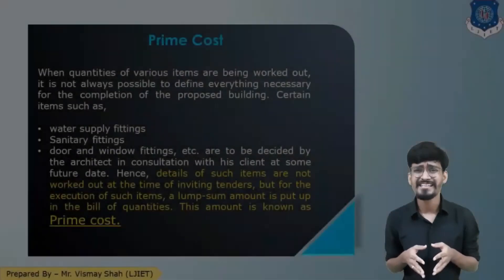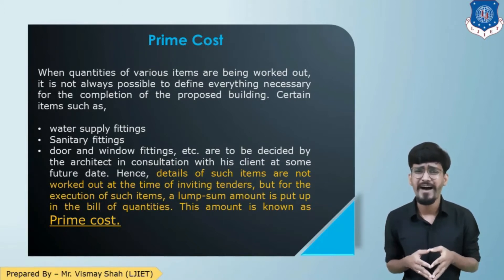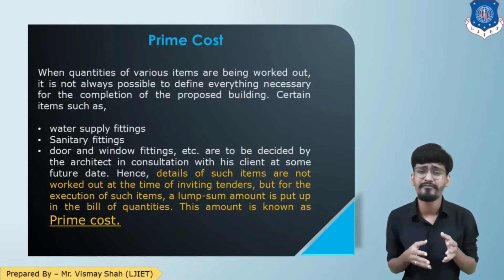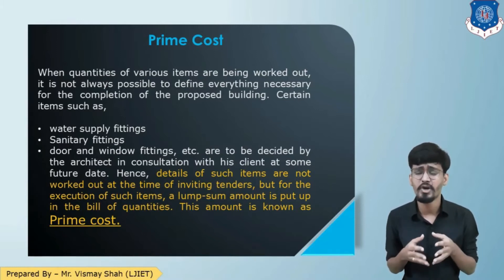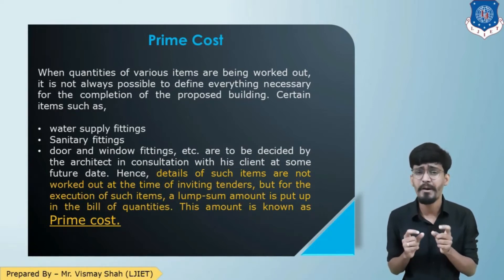Moving forward, the next is prime cost. When the quantities of different items of work are being worked out, it is not always possible to define everything necessary to complete the work. For example, water supply fittings, sanitary fittings, door and window fittings, etc. These are items which are finalized at the execution stage by the architect, owner, or owner's representative. A detail estimate is not prepared for such items, and a lump sum amount is provided as prime cost in the tender. That lump sum amount against this kind of item of work is known as prime cost.